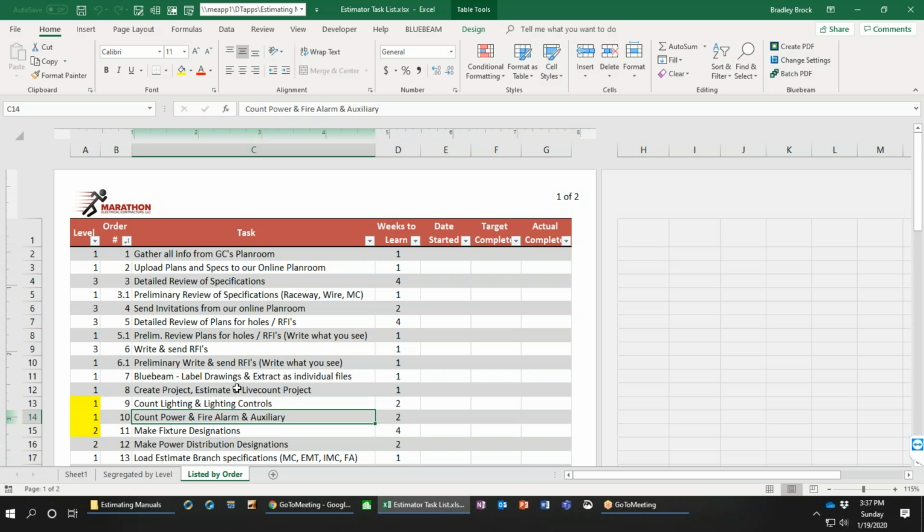So, purchase conduit, purchase wire nuts, purchase devices, and then the labor to install that, labor to install hangers and put in nuts and bolts and washers. And then also the quotes that we receive. We'll put together quotes for light fixtures and lighting controls devices and power equipment and medium voltage systems, whatever that may be, and come to a total dollar value.